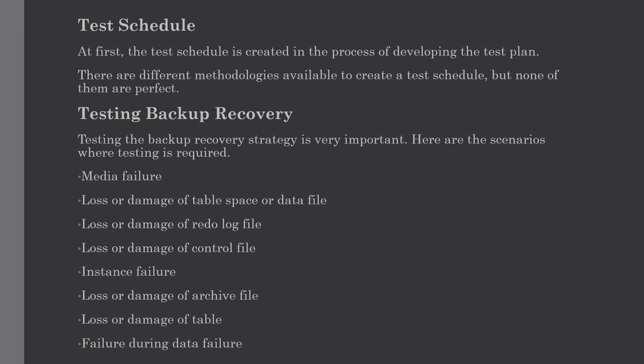We can face some issues while creating a test schedule. A simple problem is that a large query may take a day or more to complete and may not finish within the desired time scale. There may also be hardware failures such as losing a disk, or human errors such as accidentally deleting or overwriting a large table. Due to these difficulties, it is recommended to always double the amount of time you would normally require for the testing process.